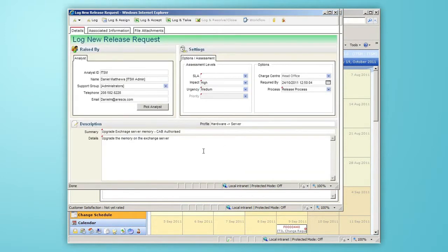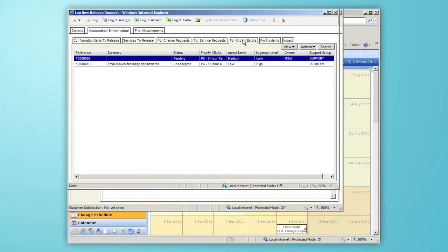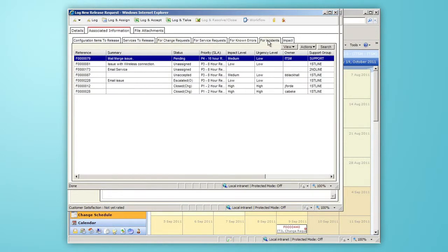The new release request inherits all the information from the change request so we can see the change request, any known errors, or any incidents that will be automatically resolved, closing the loop once this release has been implemented.